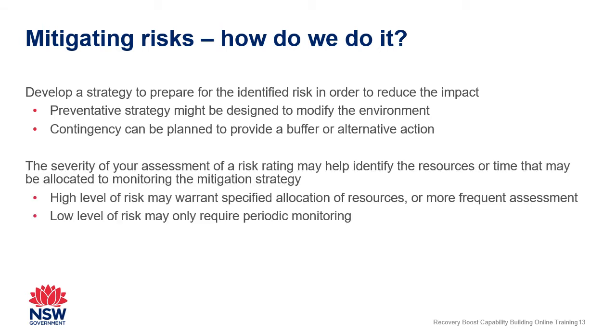Your risk rating might inform the resource you put aside for the mitigation strategy. A higher rated risk might require some funds or people power to set aside. Lower level risks might only require periodic monitoring.